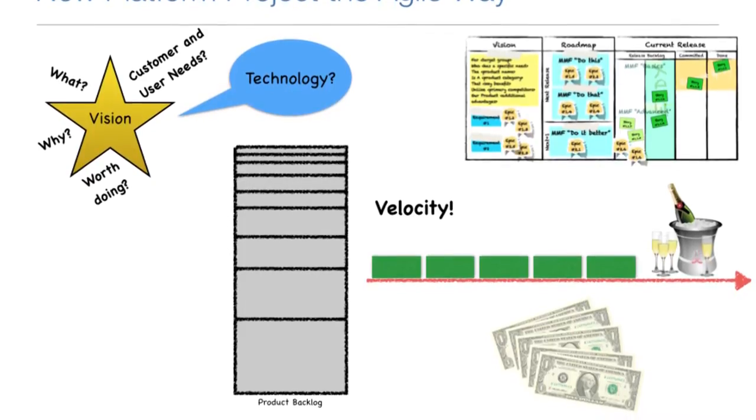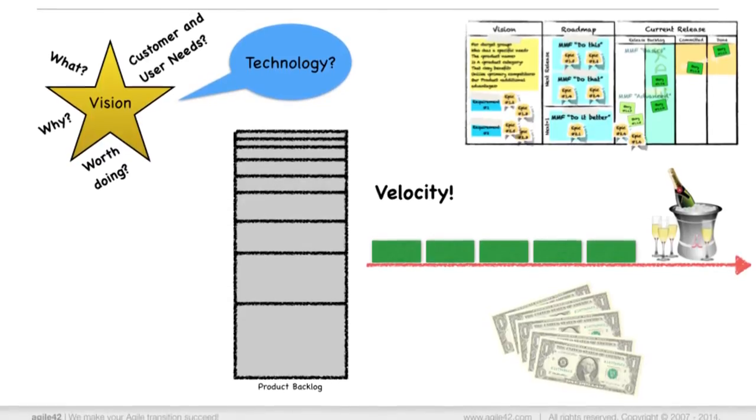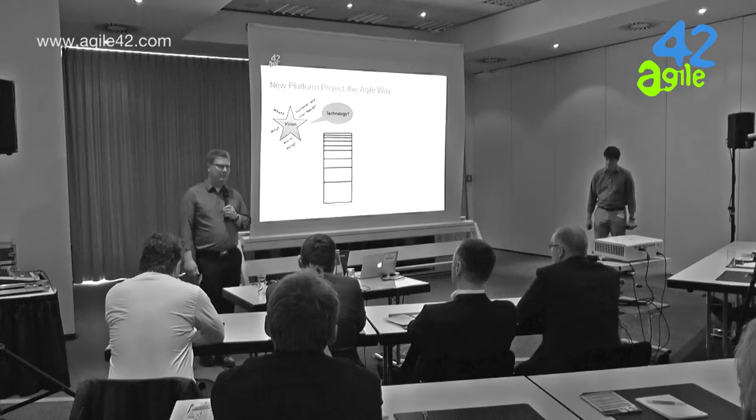The old platform that this company, this team was replacing, has been around for more than 15 years. So it's also about how long time can we get those components. More popular speaking, which vendors do we want to get into bed with? The team made the technology decision, and based on that, the team met with people from business, the product owner was of course there, and the Scrum Master, and in a three-day workshop, they wrote their first product backlog.